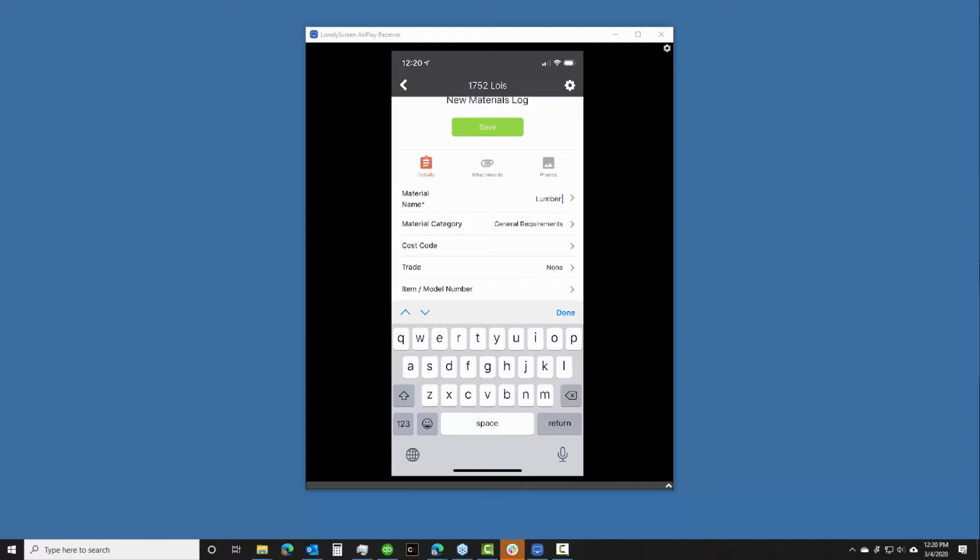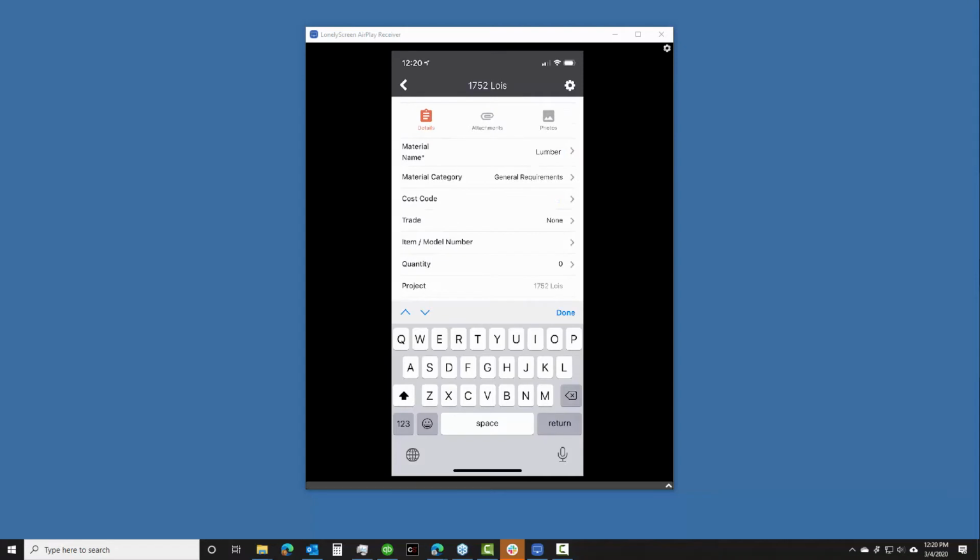We're just going to go ahead and snap a picture, create a quick log from that, add some notes, and we're done. And that way anyone on the team who needs to can receive an immediate notification as that log entry is posted. It's immediately available to everyone who's a part of that project on Construction Online, of course, with that appropriate permission level. And then, at the end of the day, usually there's nothing to do except maybe a couple of additional notes or something like that. But most of what's happening throughout the day on the job site is being logged, more so in real time.